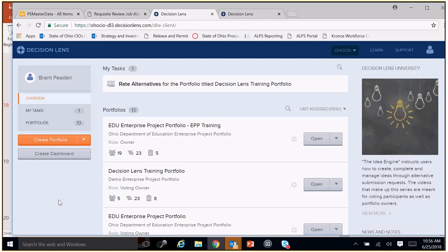So the question was about the cycle and the timing. I think the plan is this is a quarterly event if your agency has new initiatives in the model. You can add new initiatives anytime, but then the voting will be turned on and off with some coordination and communication. And if there are only a couple of initiatives added for that quarter, then only those 2 initiatives would be rated. You don't go back and rate all the initiatives that are already there, unless there is a need. If there is a change in scope or dollars, any major change in scope, then you may want to re-vote.